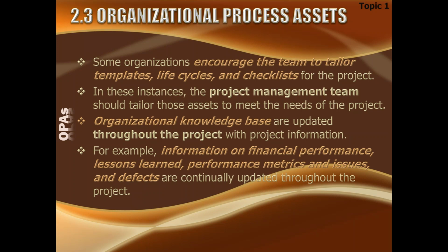The other part, the old files, can be updated by the project because project results will also be submitted into the organizational knowledge base. So our project information will add to it. For example, information on financial performance, lessons learned, performance metrics, and issues and defects are continually updated throughout the project.